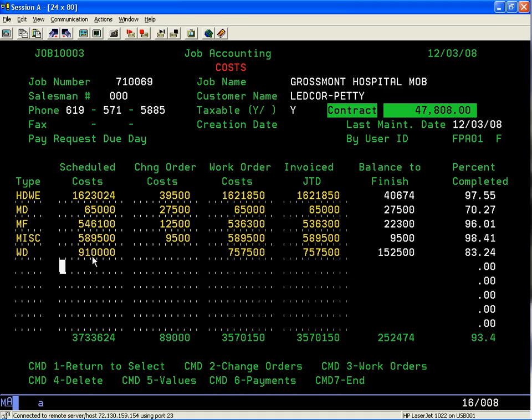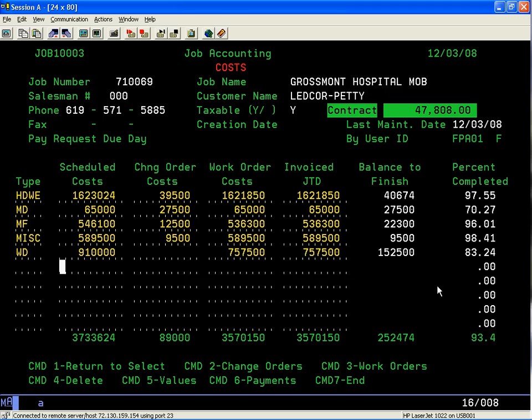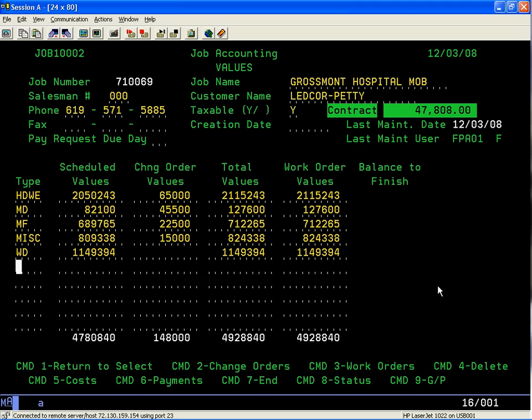Command 5 shows you the costs on the job by category. You'll have your schedule or estimated costs, your change order costs, your work order costs. As you generate work orders and purchase orders, those actual costs come up on the screen, and as you're shipping information, those costs keep coming over so you can keep a running tally of where your job is and its percentage completion.